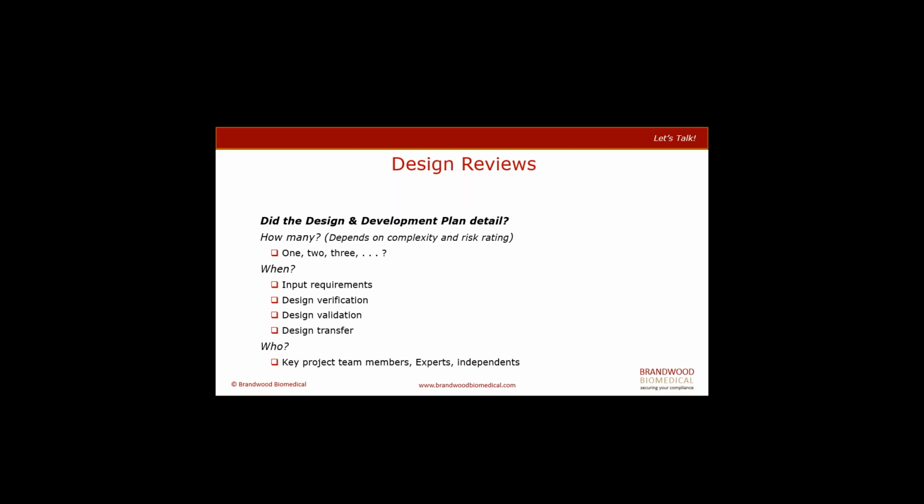For example, it could be an input requirement stage, so that all the requirements are reviewed by the panel or the team members to identify that the various areas have been captured from an input perspective. There may be one then at design verification stage, possibly another at the design validation stage, and again at the design transfer.